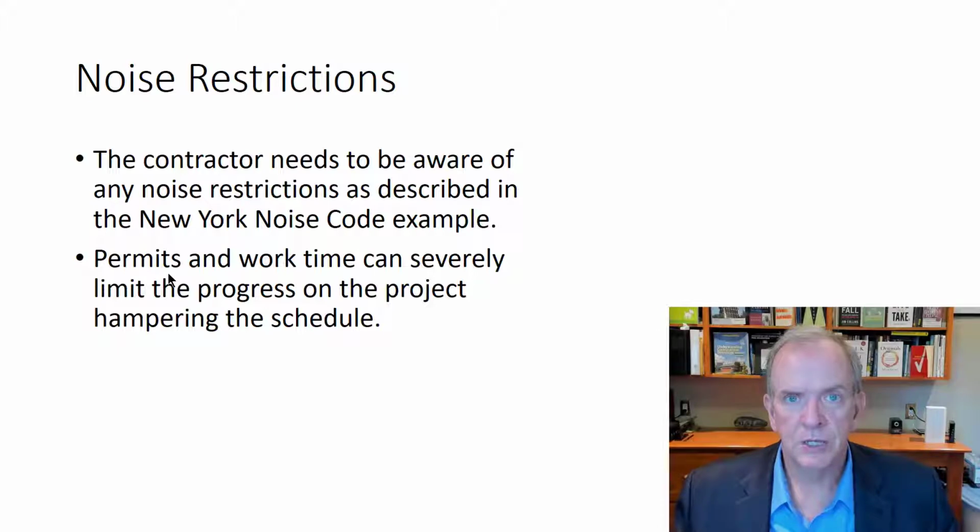Toronto has a lot of limitations on when you can do work and the type of noise that you're making, and there are special requirements to do that. And I even heard that when the Eglinton Crosstown was being built, so it's a government project, right? It's falling behind schedule, and they still want to finish on time. Well, one of the solutions is you work longer hours, but then there's noise, and so then you've got the city saying, no, you can't work those extra hours. So you've got one level of government wanting you to do it and another level not wanting you to do it, and so that can be quite complex as well.